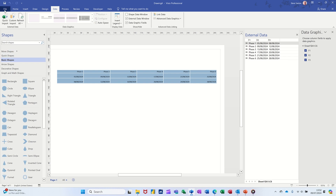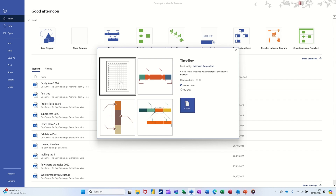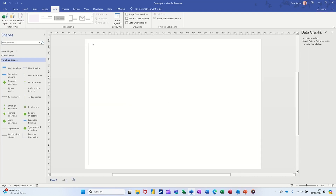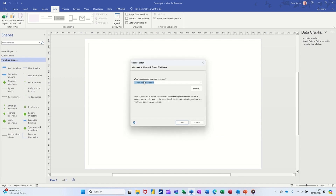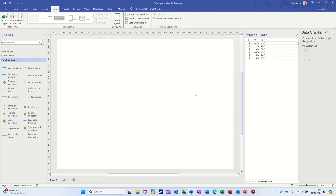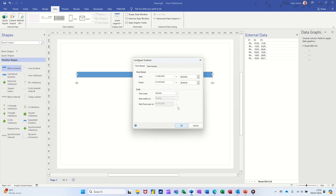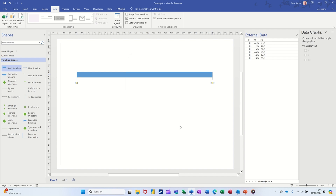You can do a similar thing with the timeline template. Go to File and find the timeline option — it's in Scheduling. Double click it and it will create a blank timeline. I'm still on the Data tab, I'll get the data and it'll remember it from before. Click Done and it'll bring it in. Bring a block timeline on — it's coming for six months, so let's set the end to around the 31st of October. I'll leave it on months, click OK.